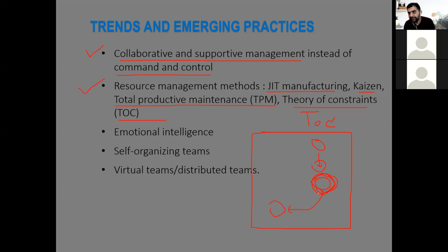After analysis of that work, we remove all extra work that is not the key work, not the main thing this component needs to do, and we share that extra work with other components, so that this bottleneck is doing only the key work that is slowing the whole system. That's the first thing we do.